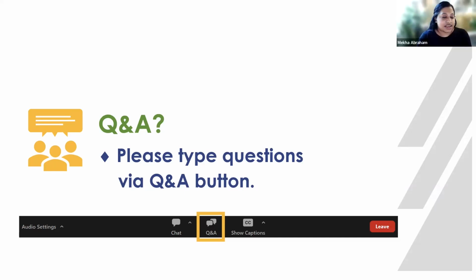Yeah, that's a great question. I guess I would start off with when I had relayed the prerequisites related to timelines of when the project, if they are selected for open enrollment, if you're able to reserve incentives within 6 months of being selected and finalize your scope of work and then start construction within a year. I think that's the first question to ask yourself. And if you feel confident that you can meet those timelines, we would encourage you to apply for open enrollment.